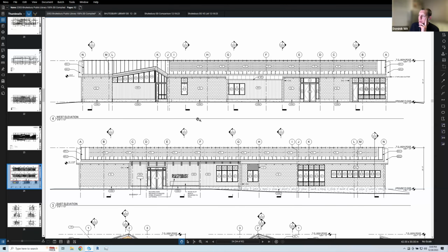Yeah, I agree. I don't think we would see major savings there to switch. You're talking about this wood at the entry and these elements here. So Mary Ann, right now the slate siding is being carried at $34 a square foot and the wood siding is at $40 a square foot. Both have the same 2.5-inch furring over plywood with rigid insulation behind it. So we're talking not even $10,000.